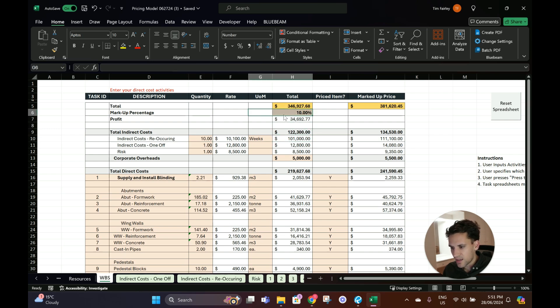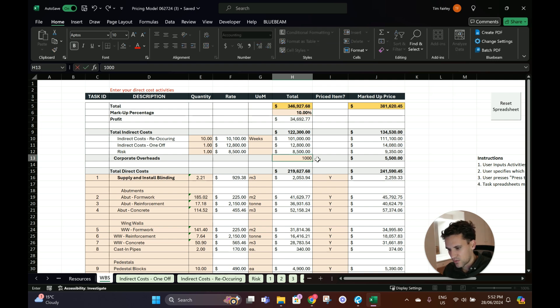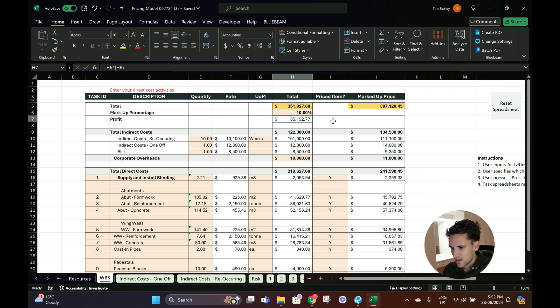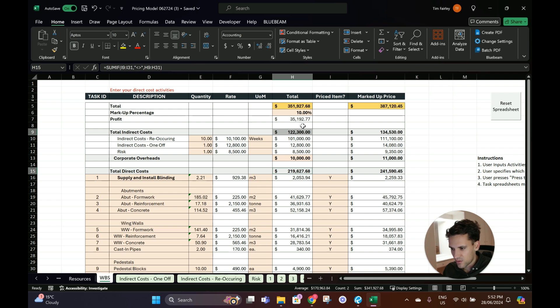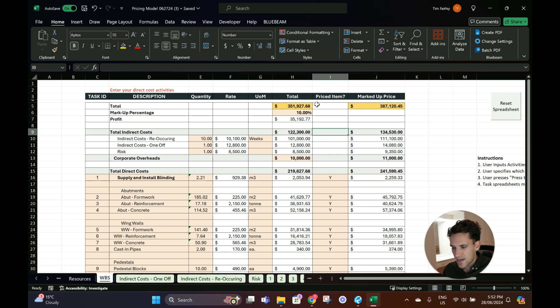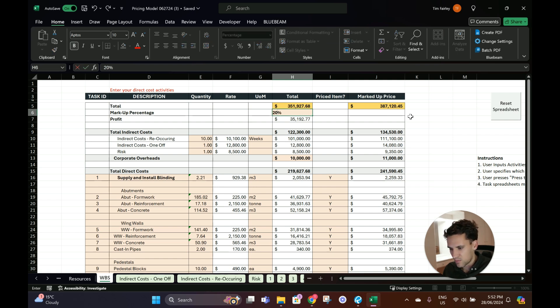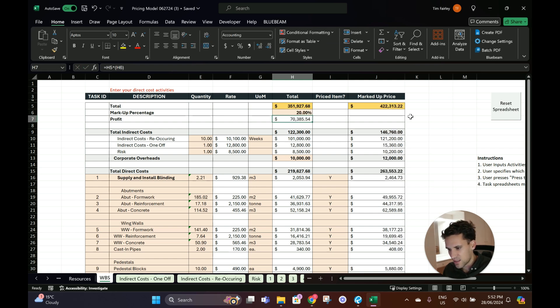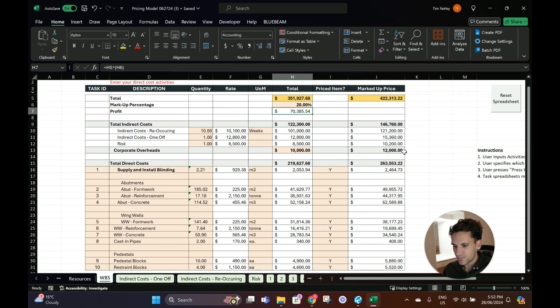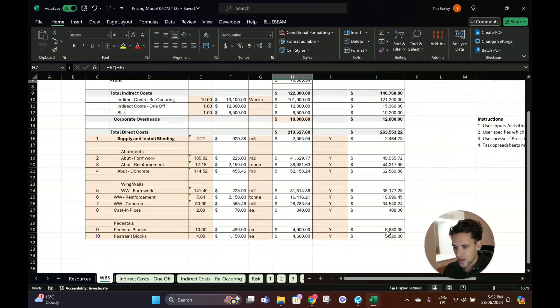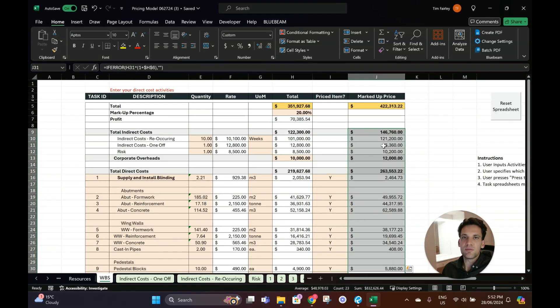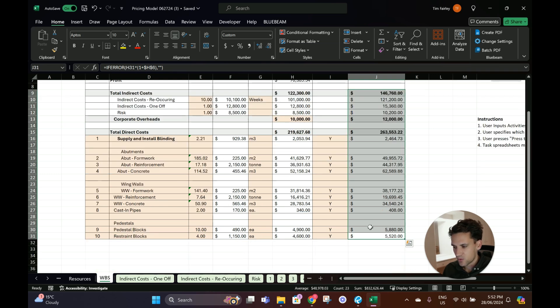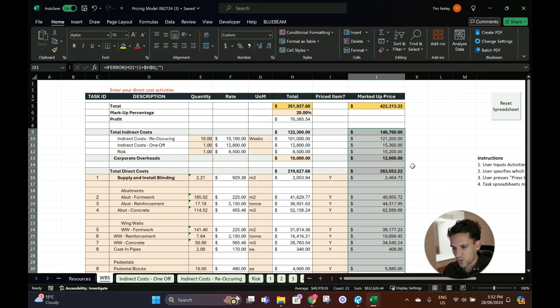Next we put in a markup percentage, so that's 10%, and any corporate overhead - if we've got $10,000 of corporate overheads with 10% markup, our total cost looking at the directs plus the indirects is $351,000, and our marked-up price for the 10% margin is $387,000. We could make that a 20% margin, so $422,000. You can play with that. You could send them the marked-up prices and the billable items, you could just send them the total - it depends how much you're breaking it down for your job.